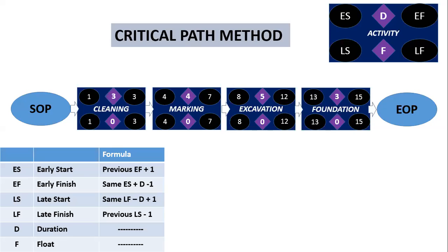What's the early finish? 13 plus 1, 14. 13 plus duration, minus 1. What is the duration? 3 days. That is 13 plus 3, which is equal to 16. 16 minus 1 is equal to 15.